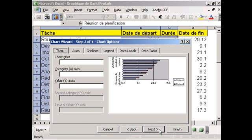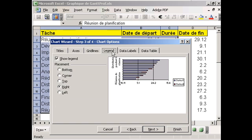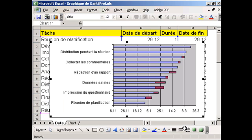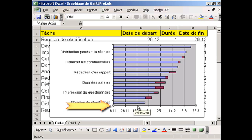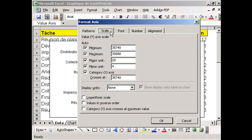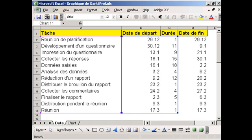In step 3, we deactivate Show Legend. Now we have to make some changes to the horizontal value axis. The maximum and minimum values on the scale tab must correspond with the first and last date in the date range.